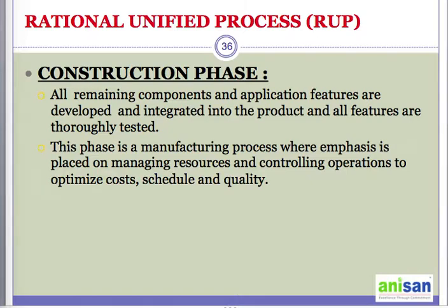That's around 10 to 20% complete. Then we have the initial project glossary, and then an initial business case, which includes the business context. And we also produce the initial risk assessment. Then we have a project plan that shows the phases and iterations, and a business model if we have any, and one or more prototypes. So that was in the inception phase.